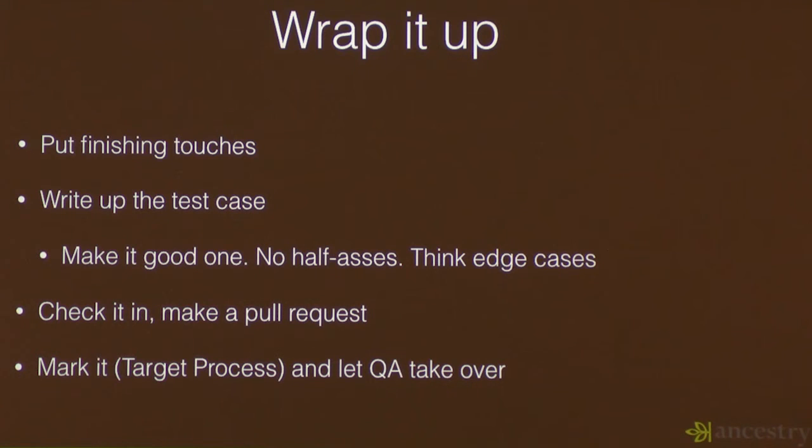Yeah? You mentioned 13 points. Do you break it up if it's that big? Well, okay, so the question is, if you have 13 points, do you break it up? It all depends, because it's relative. These numbers are relative. In one team, a 3 may mean something that's this big, but in another team, a 3 may mean something that's this big. We had a rule where if it gets higher than 13, we break it up. I was on a team a couple quarters ago where if it was 13, it was too big, and that was getting broken up. So it all depends on it.